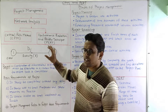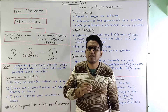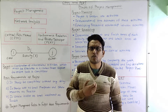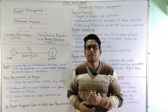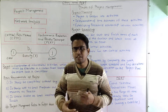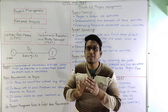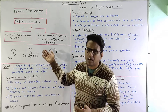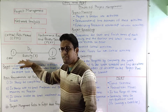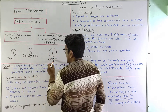For activities, we have different types: critical activity, non-critical activity, and dummy activity. Critical activities are those where delaying them will surely delay the project by that particular time. For a non-critical activity, if we delay it, the project may or may not be delayed. A dummy activity is not an actual activity in the network — it is inserted by us just to follow the precedence relationship, and it does not consume time or resources. An event is the starting or end point of an activity.